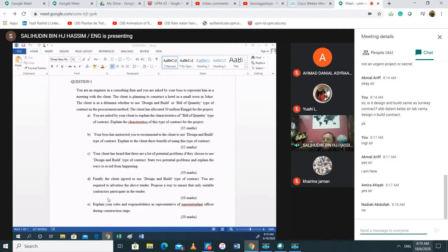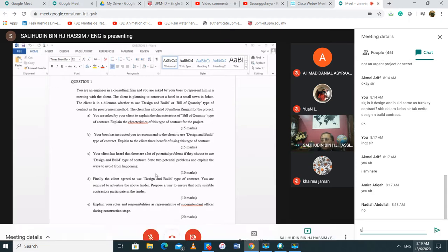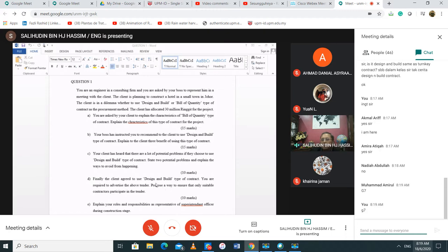Of course, first thing you must call the right group of contractor. The size 30 million. 30 million means what? You call group G what? G7. Okay.